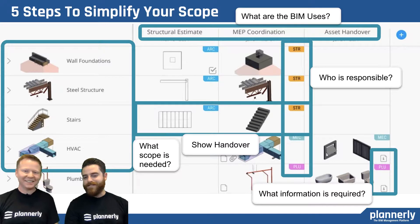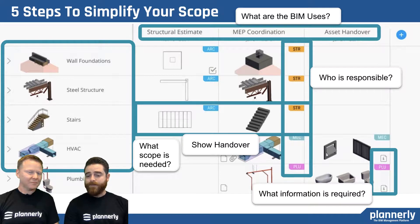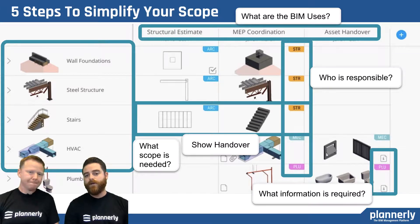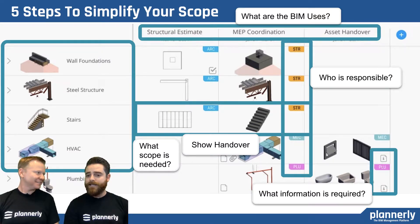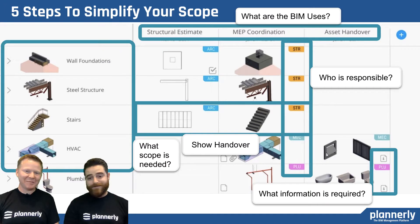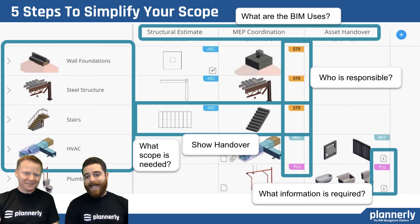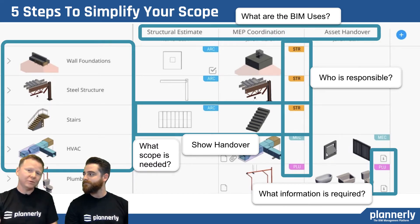Another example: an owner who always worked with the same contractor had been spending lots of time providing information for almost every component in a model. But when they sat down and actually asked what information was important for specific elements, they ended up having a 45-minute conversation on the exact scope they needed. They started saving hours of time on all future projects by minimizing to just 17 parameters and only a few dozen pieces of equipment they were really interested in having after handover. Suddenly everybody understood the scope — not just their own, but also that of all the parties they were working with. It's an incredibly powerful moment.